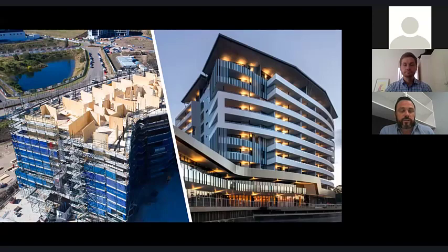This is another project. This is Avio in Sydney, which was built by Strongbuild and for Malfa. And they adopted a scaffold approach where they built the scaffold, chased up the timber structure, which then allowed the facade to be installed manually via the facade component. And it's pretty obvious why. You look at the facade, it's pretty complicated. We wanted to put different examples of facade on there and just show that they can be adopted to a timber frame or mass timber structure, but the different methodologies that need to be considered and how they relate to cost and design to achieve that.